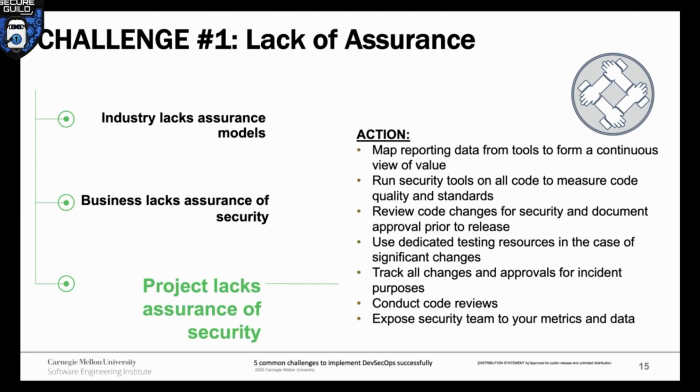So basically plan all the security requirements into your project so we can really keep track of the project requirements or the security requirements at the beginning, because we allocate the resources. One of the findings I find many times in the surveys is that developers don't have enough time to address the security because we don't plan the time at the beginning. That's the place we can think about the time when we do the project planning at the beginning. So basically adding the requirements of the security thinking and also resources at the beginning of the project.